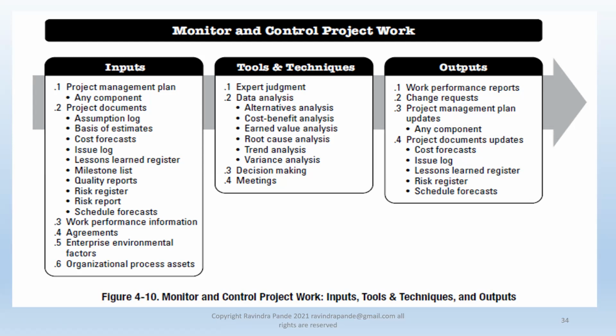large. So what we normally do as a project manager is try to put these change requests into the next sprint, so that we can adjust and plan it much more effectively, and we can get the client sanction as well. There is a specific committee called the steering committee or change control board, which normally helps the project manager make sure that whatever you include in terms of change requests has to be weighed and analyzed before, so that we know how many resources and how many hours are required for the change request.